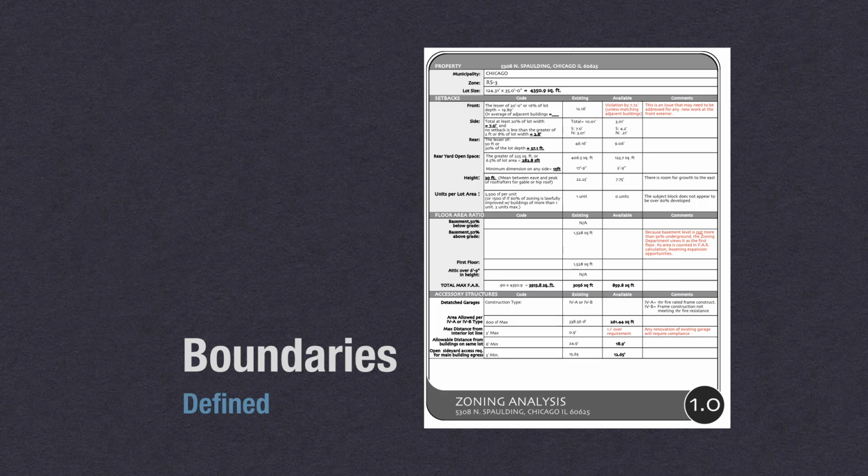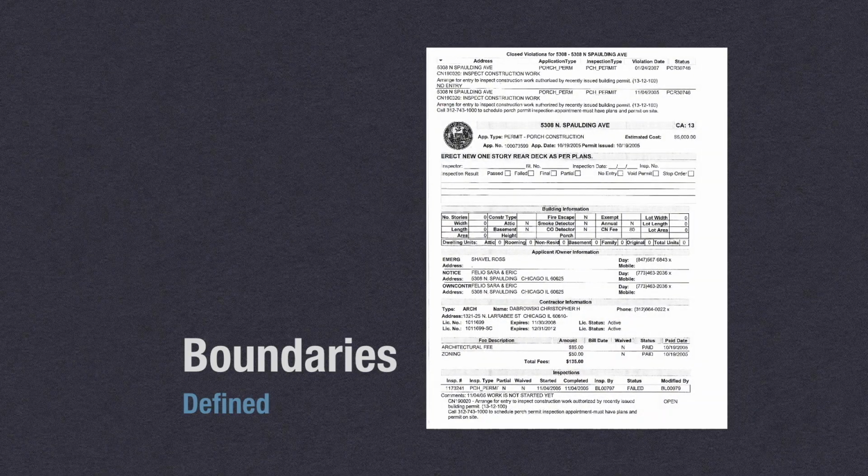So we'll give you a nice little report and then turn that into a graphic over your existing plat of survey. If required, we may also, especially on renovation projects, do a Freedom of Information Act request with the municipality to see what other permits were pulled on your particular property over the years before you purchased it, to make sure we don't have any red flags that may come up as surprises that you have to deal with now that you are the current building owner.